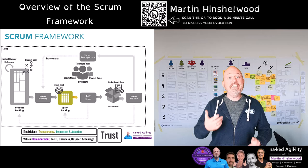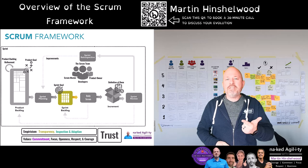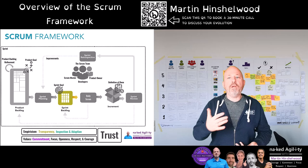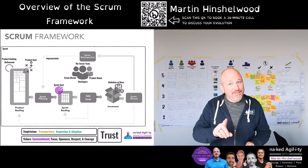Next is the sprint backlog, which contains three things: a sprint goal, the work that the developers have selected for this sprint, and an implementation plan to help them get started. The purpose of the sprint backlog is to provide transparency over what we are doing now — transparency of the present. The commitment to the sprint backlog is the sprint goal, which informs but does not control the contents of the sprint backlog.